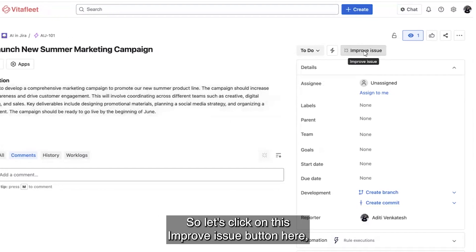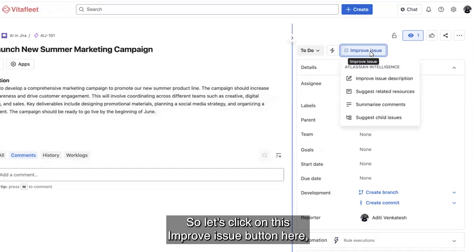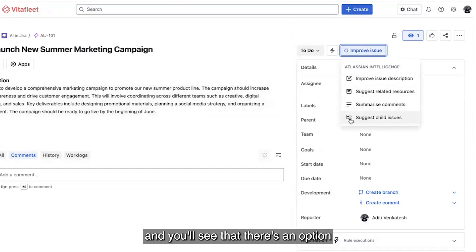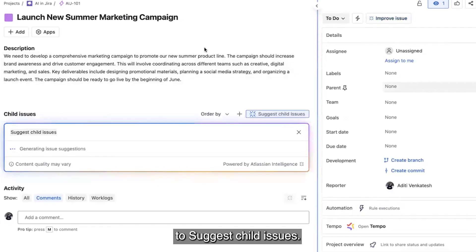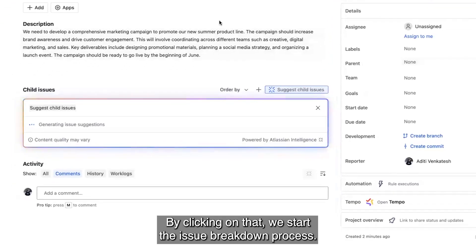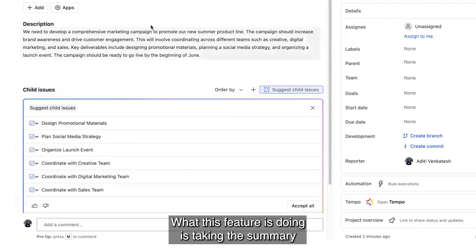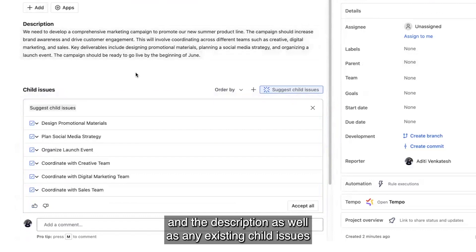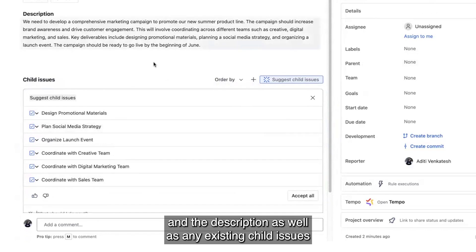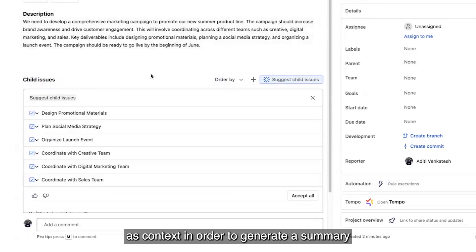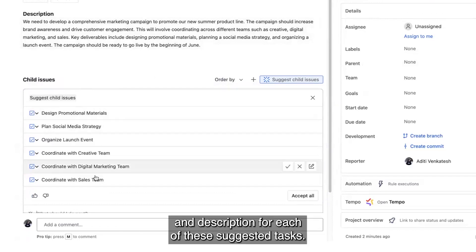So let's click on this improve issue button here and you'll see that there's an option to suggest child issues. By clicking on that, we start the issue breakdown process. What this feature is doing is taking the summary and the description as well as any existing child issues as context in order to generate a summary and description for each of these suggested tasks.